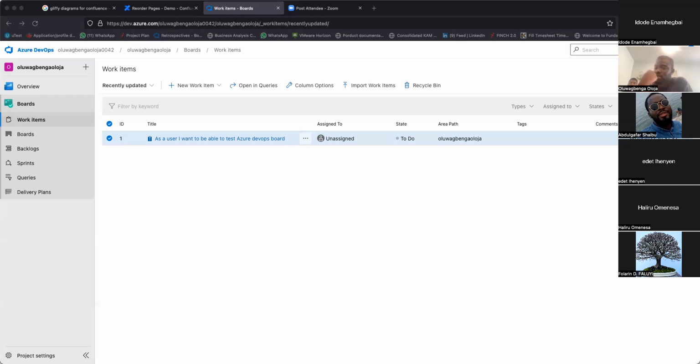So guys, we're here now. The tools we use is Azure DevOps. For the people that are not familiar with this, don't worry, I'll show you around. I've explained our backlog roadmap. We need to deliver this solution in 6 months. However, we need to deliver iteratively every 2 weeks.